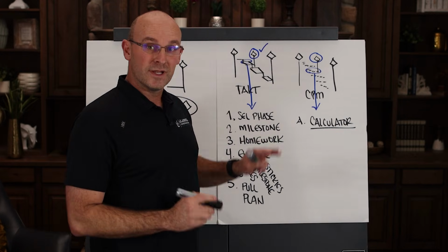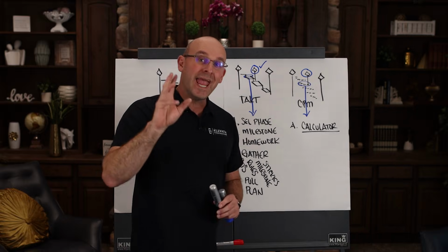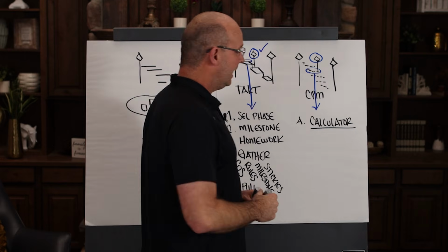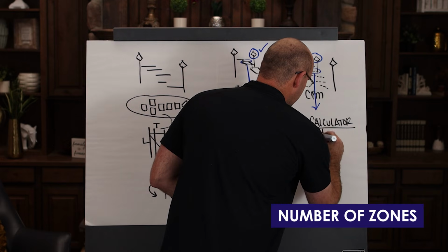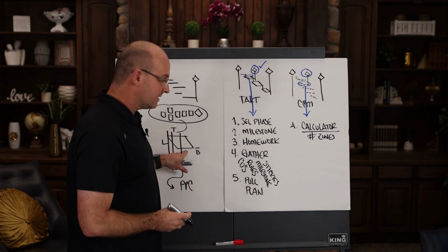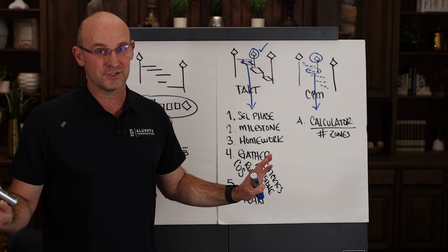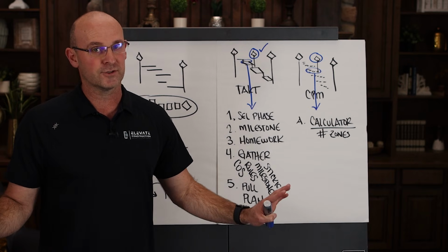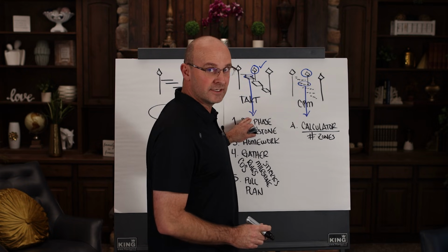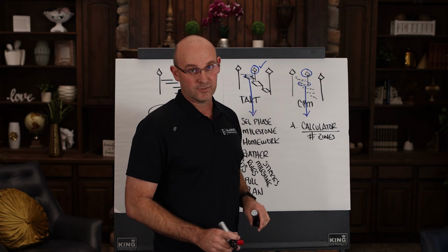The calculator will allow you to plug in how many zones you think you have in this phase and allow you to take these activities in the sequence. That's why you have to have a master schedule. And it will allow you to know the number of zones that you want to target because you want to gain time in this norm level production plan and gain buffers. You cannot do a production plan without buffers. You cannot have a milestone you're targeting without buffers. And so this is genius. You can easily do it from Takt because it's already set up, and you can do it from CPM. I'm just hoping that milestone was set properly.